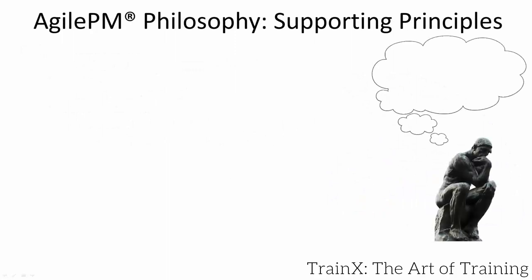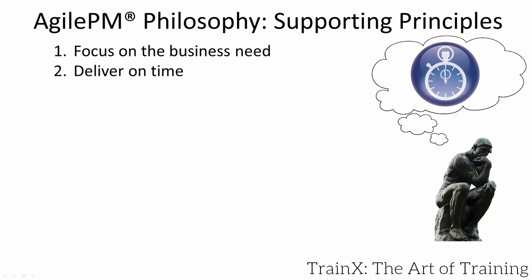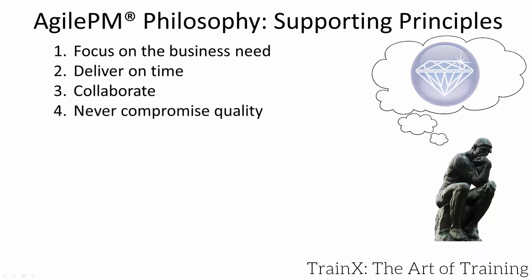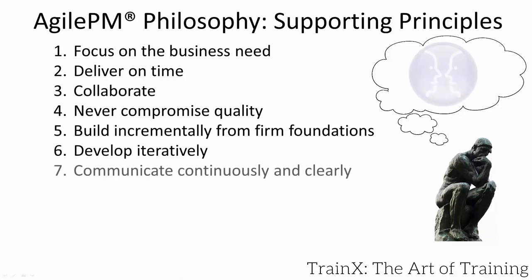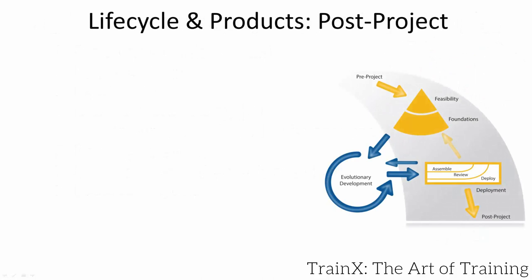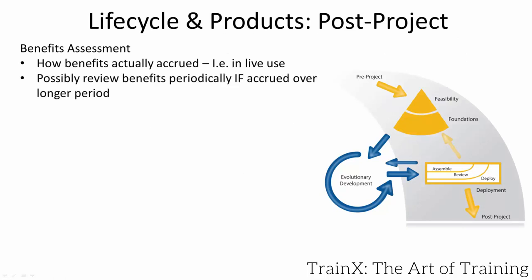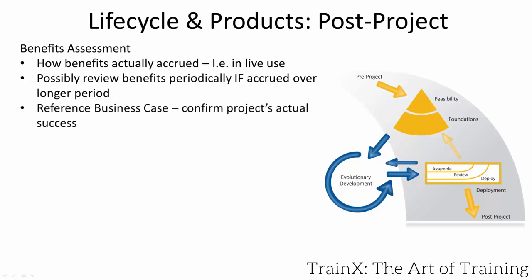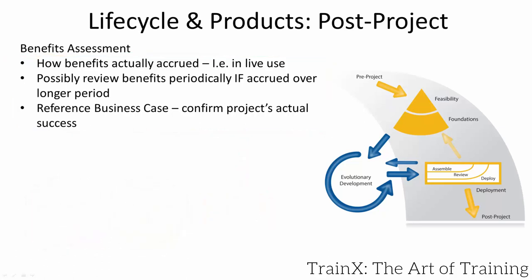For completeness, here are the eight principles listed out — we've seen them in context at points during the video. Benefits for most projects accrue over time. Measuring this accrual allows the organisation to understand whether the project has met its objectives, particularly to provide measurable benefits in the timescale described in the business case. For our case study, we'd hope to see room management reaching 100% revenue and customer ratings reaching or exceeding 4.5 out of 5 in the described timescale.